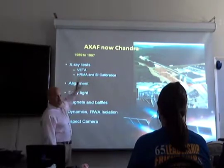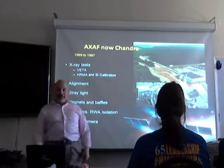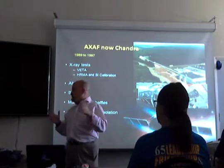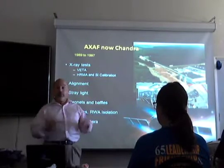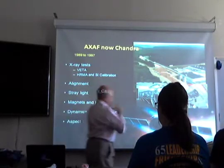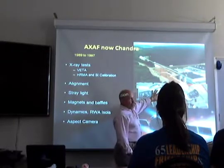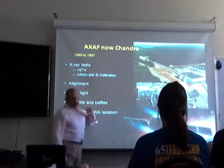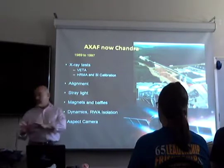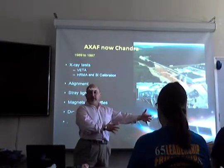So some of the things that I was involved in was the early X-ray tests. How many of you have heard of TRL-6? So TRL 6, Technology Readiness Level 6, indicates that a system is essentially ready for prime time. The technology was sufficiently developed for flight. We did not have that sophisticated terminology in the early 90s, but we followed on the heels of the production of the Hubble Space Telescope primary mirror. This was before the spherical aberration was revealed, and it was just annoyingly late and over budget.